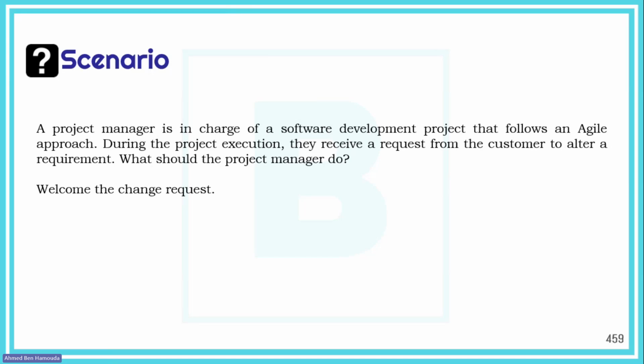Now, the customer sends the email, the product owner logs it in the product backlog, and then the rest is done as we described, with the analysis of the impact, the prioritization, defining the value of the change, etc. It has to go that way. Just because we're in Agile, we don't just implement changes back and forth, in and out. That does not happen that way.